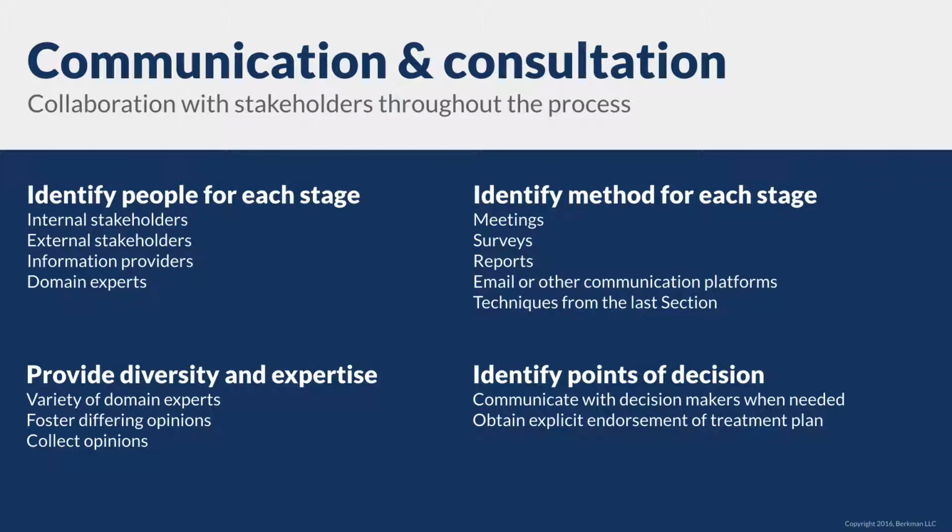The team performing legal risk analysis should explicitly identify the method or techniques used for each stage. Some are more useful than others. The method should be tailored to the potential risk, the available resources, and the skills of those involved. An email soliciting a list of potential risks might be less than effective. The prompt is insufficient. The recipient's state of mind is not focused on risk management. The level of detail in the responses varies widely. There is no real-time interaction among participants. An email survey after a live brainstorming meeting can, however, effectively elicit deeper analysis upon reflection.